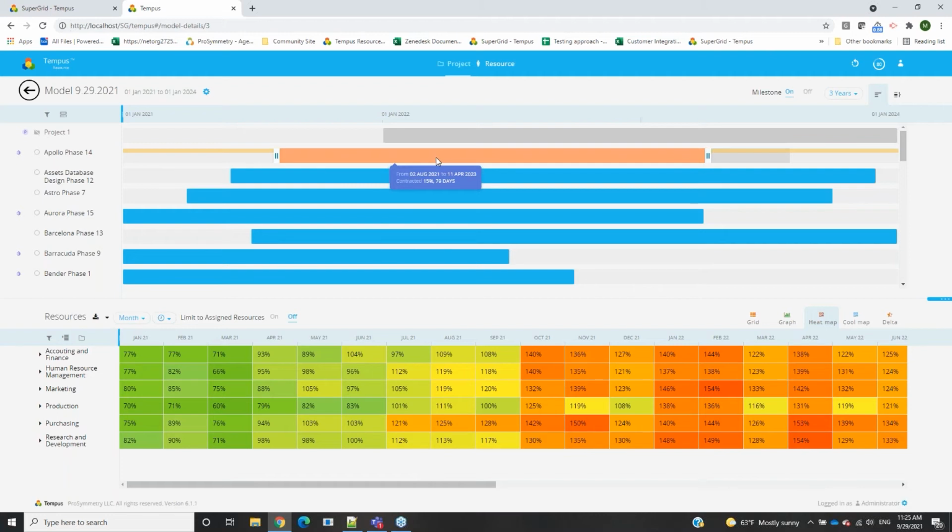It is important to know how the calculation behind the scenes is happening, because sometimes you may need to expand a project and increase the duration, but on top of that, you also need to add additional hours to the project. You're not just expanding it out with the same amount of work being asked. Maybe you need to increase the amount of work being asked, or in the opposite fashion, decrease the amount of work. Maybe the project's going smoother, and we're not going to need the same amount of manpower or FTE that we initially thought. You'll have the option to do that as well.